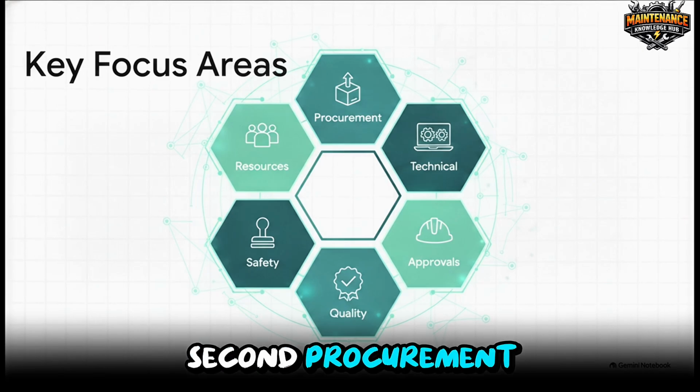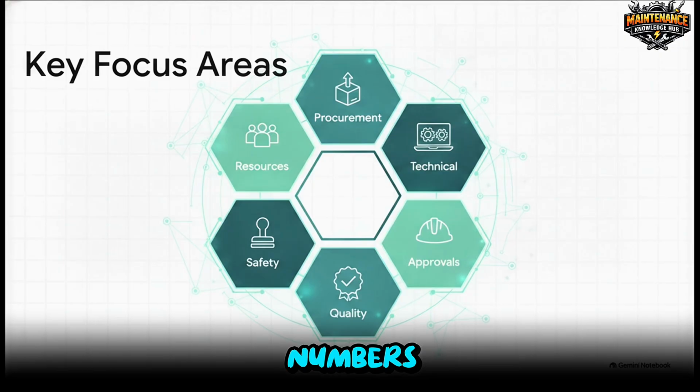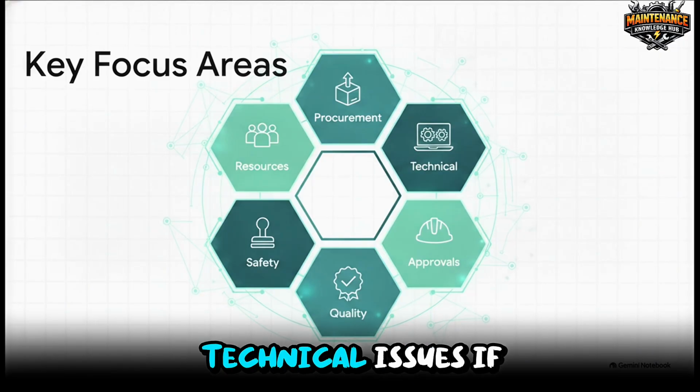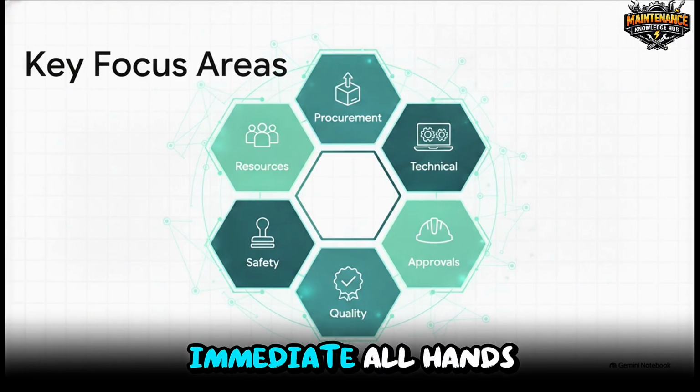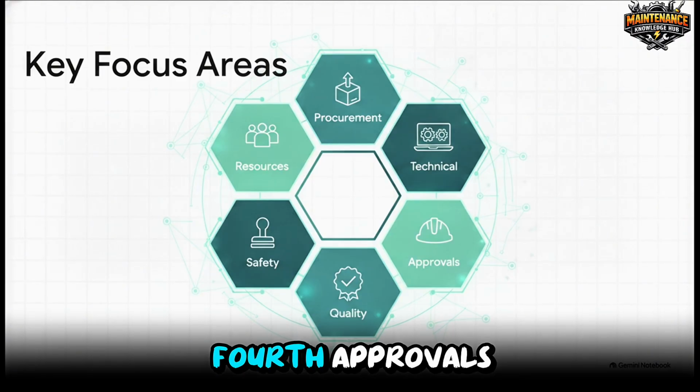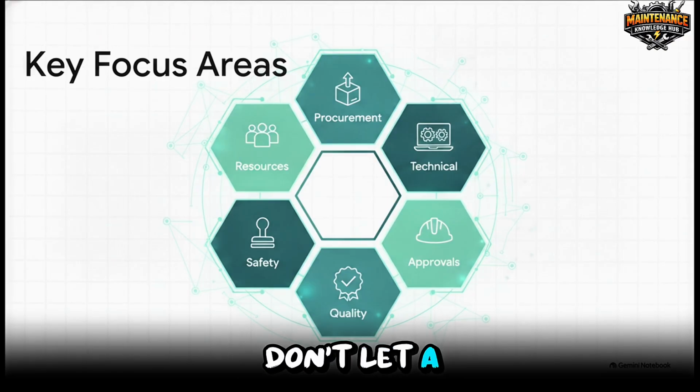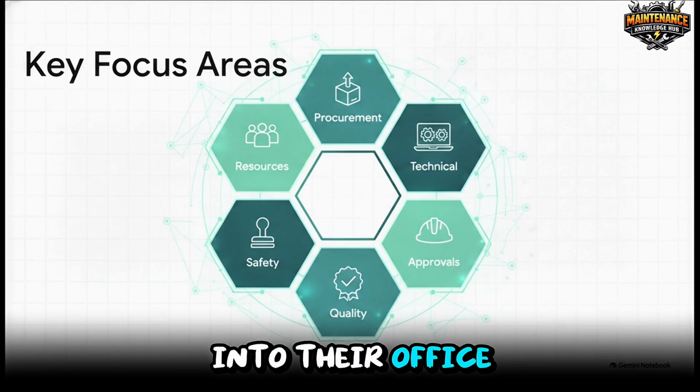Second, procurement. Are you personally tracking the shipping numbers and customs clearances for materials on this path? Third, technical issues. If a bug or a glitch pops up here, it requires an immediate all-hands-on-deck response. Fourth, approvals. Don't let a critical task sit on a manager's desk waiting for a signature. Literally walk it into their office yourself.